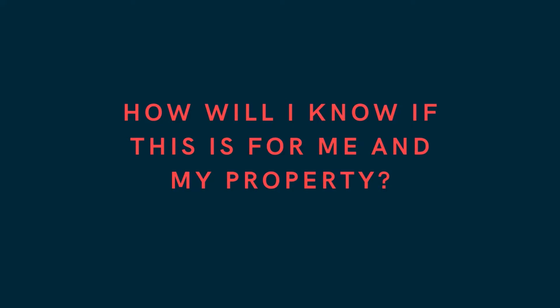So in terms of a one-off property owner, often an EWI system would be installed when the external finish of the property is in disrepair and in need of renewal, as you would already have the requirement to erect access scaffolding and provide a new finish. Therefore, the only additional cost is really the inclusion of the insulation boards. And an added benefit as well is that these works are completely non-disruptive internally, and the house can continue to be occupied throughout the course of the works.